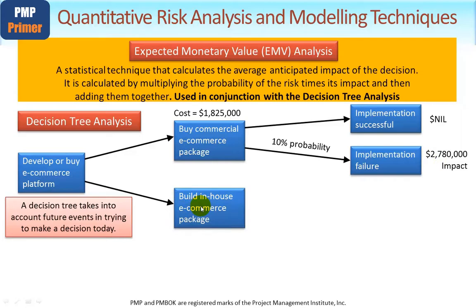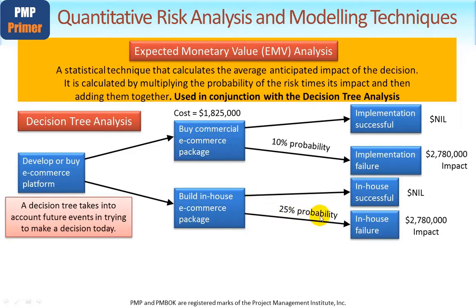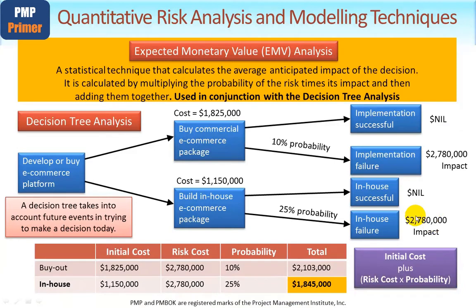Now let's look at the in-house option — if we designed and built it ourselves. If we did it successfully, there'd be no extra risk cost. However, because of the complex nature of this package rather than going to the experts, we believe the probability of us failing is higher — in fact a 25% probability. So there's a 25% probability of us incurring this extra risk cost of $2.78 million. We'd need to put this information in a table and do some simple math. To use EMV, we have to take the initial cost plus the risk cost times probability.